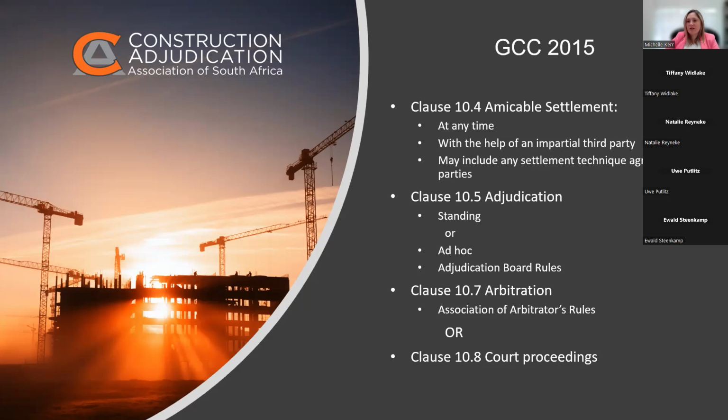But you'll see that's going back to my point of, if you have an adjudication provision that allows you to go to adjudication, you need to have a set of rules agreed about the manner in which you will conduct that adjudication and what the powers of the adjudicator will be. Otherwise, you're not going to have an enforceable adjudication clause.